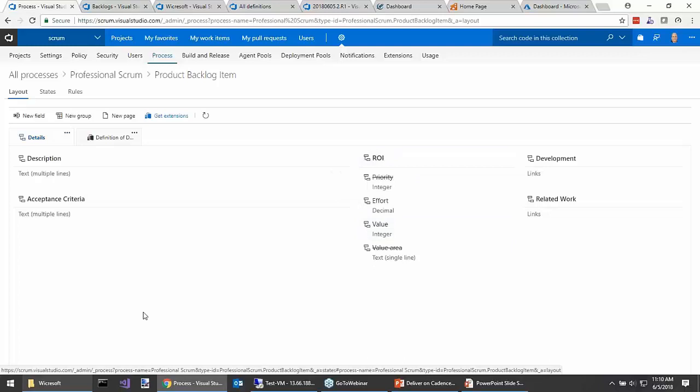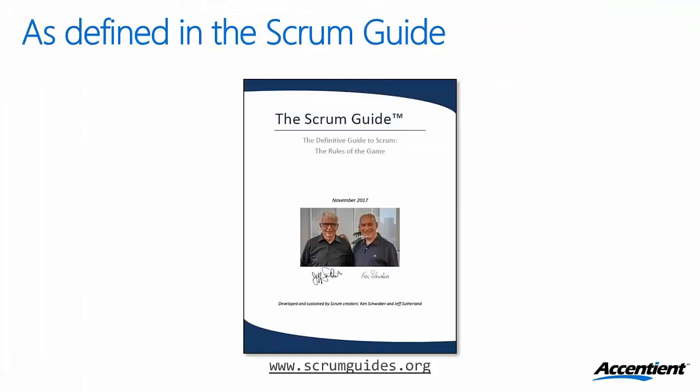I think you can just start there and keep it real simple as a product owner so that you can order items, maybe with the higher ROI tending to be towards the top of the backlog and vice versa. Because the cadence we want the team to get into is delivering the most valuable things first, or the ones the product owner wants first.